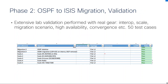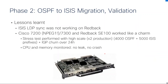We spent about one month in a physical lab with real hardware from all vendors present in those two networks. We had around 50 test cases covering interoperability, scaling, migration, high availability, convergence testing, and we also tested the migration scenario. This gave us confidence to move forward for production. Some lessons learned: we found some problems on Redback — eventually we didn't deploy MPLS LDP sync around those platforms because it was not working, possibly a bug.